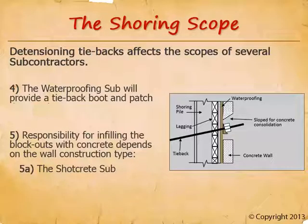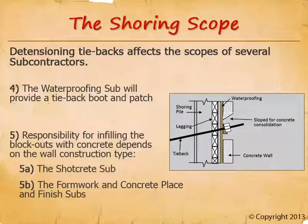After the tiebacks are detensioned and the ends cut off, the waterproofing subcontractor will come back to place a rubber boot shaped like a top hat over the head and patch the membrane to it. Responsibility for infilling the blockouts depends on the wall construction type — it could be by the shotcrete subcontractor for a shotcrete wall, or by the formwork and place-and-finish subcontractors for a cast-in-place concrete wall. When these guys come back to infill the blockouts, the building construction will have progressed quite a ways along, and you may even have finishes in place. Make sure each sub is responsible for protection of the path of travel between the building entrance and their work at each individual blockout.